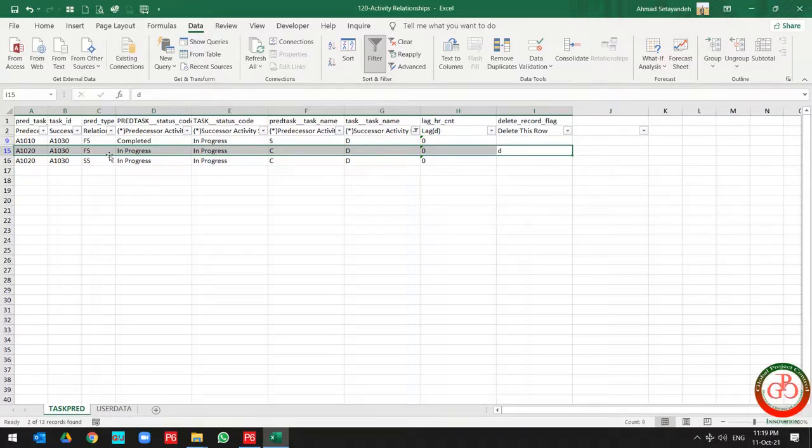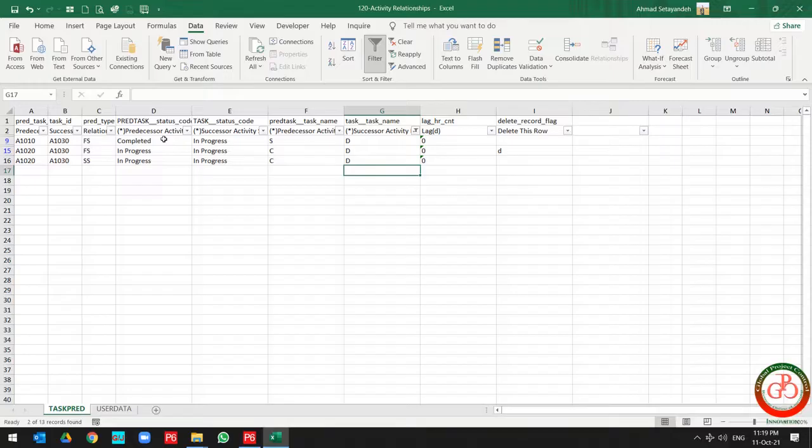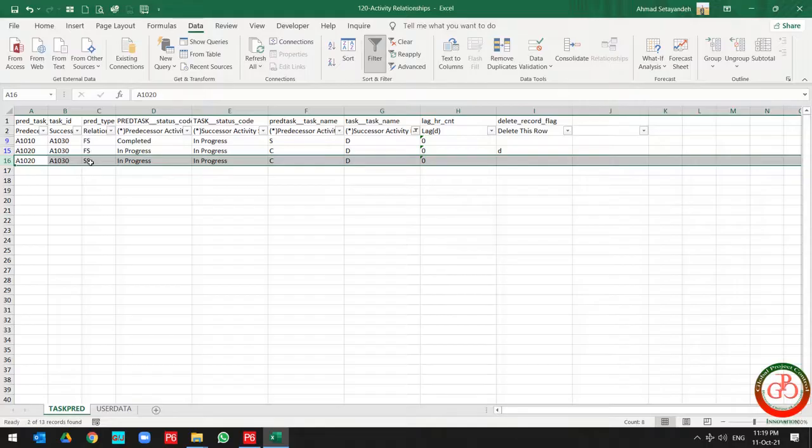So right now if I import the database to Primavera P6, then this relationship changes from finish-to-start to start-to-start.